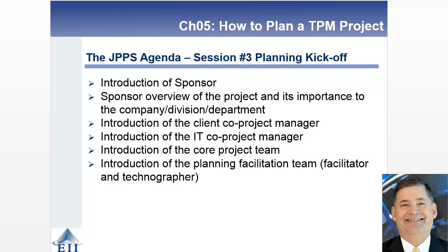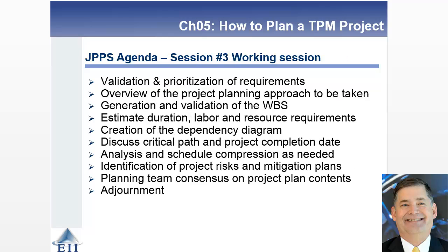Here's what that session 3, the planning kickoff meeting, looks like. You have an introduction of the sponsor. The sponsor then provides an overview of the importance of the project. Do an introduction of the client and the IT project managers, introduce the core team, and then introduce the facilitating team that you may have attending.